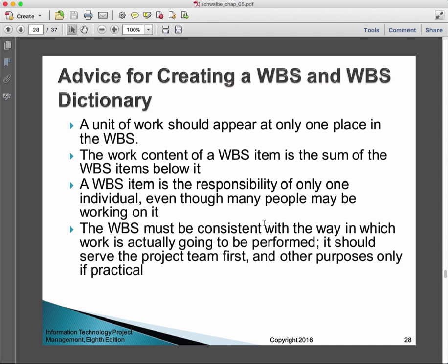This is the reason that most of us will accept a WBS in which the second level in the diagram is more chronological, and only under that we get more deliverable based. That seems to make the WBS more manageable for reporting ongoing progress and status, and so we accept that.